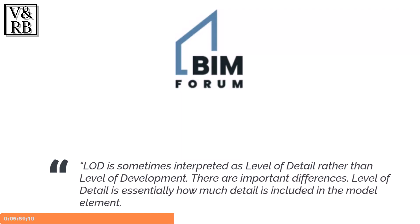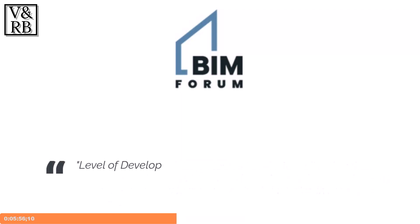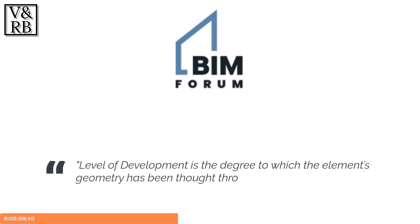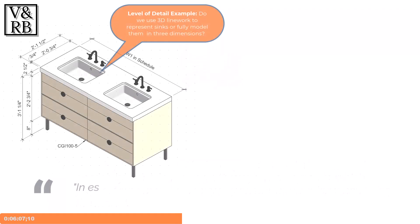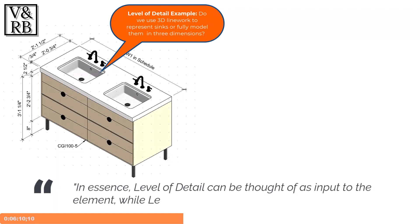Level of detail is essentially how much detail is included in the model element. Level of development is the degree to which the element's geometry has been thought through — the degree to which the project team members may rely on the information when using the model. In essence, level of detail can be thought of as input to the element, while level of development is reliable output.